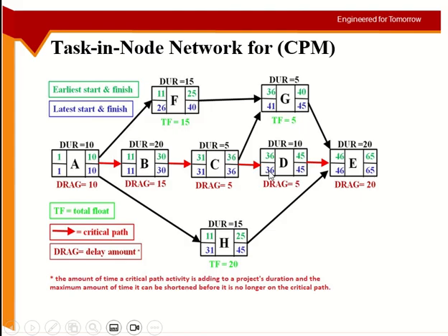So if I go back from here, it should be 35. If I go back from here, it should be 40. Now if I write 40, I am breaking this dependency. I'm not satisfying it. So I have to put 35 here. So 35 will satisfy both of them, because this one will be after 35 and this one is also after 35. 41 is also after 35. So I don't have any problem with that.